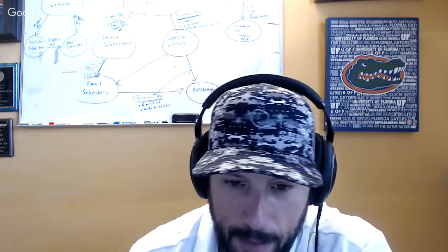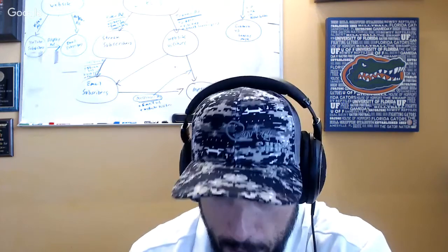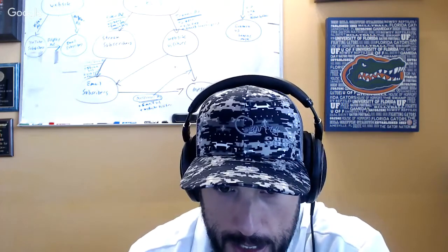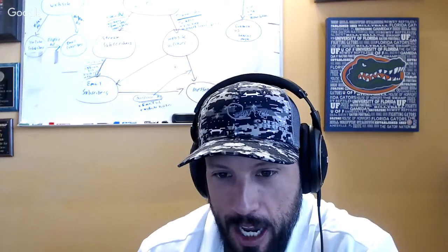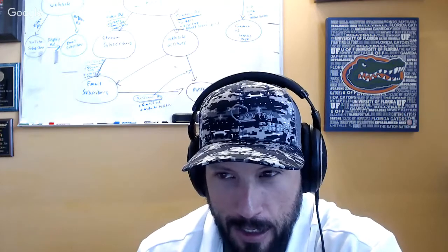And by the way, a stand up is just, what is it? It's developers only. Developers are the only ones who speak at a stand up. It's 10 minutes of your best routine. And you see how many laughs you can get. That's right. It's kind of like every person has a scene and they act it out. But each developer will say what they did yesterday, what they're going to do today, and what, if anything, they're blocked on. Exactly. Those three.